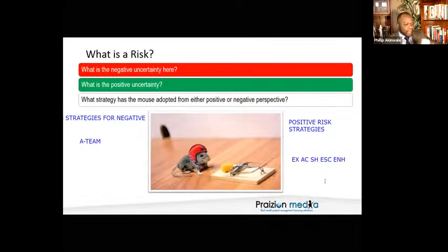Phil's boss encounters a risk that will affect a particular part of the project. Instead of carrying out that piece of work, they decide to remove it from the project management plan. What strategy is that? They remove part of the scope from the project management plan. Thank you, Yolanda and Cadian and Maribel. That is correct. Avoid. So removing some of the scope is avoidance. Doing something different from what you originally planned, that is avoidance.